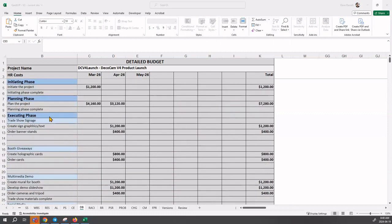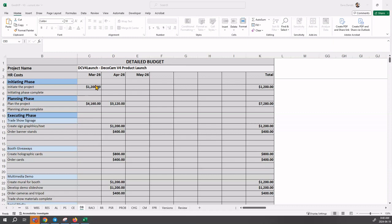So for each activity, Gantup automatically places the cost estimate that you created on the CE sheet and automatically places it into the correct month.